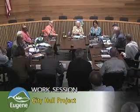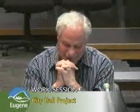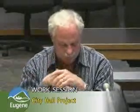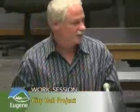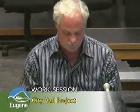Thank you. Councilor Zelenka. And that decision also saved us over $8 million in cost of remodel versus rebuild versus build new. So $1.4 million for 17 to 20 spaces, $75,000 a space, is just too expensive for me. I can see the value of underground parking in the future, and if we had gobs of money, I'd say, yeah, let's do that. But I really don't see us doing phase 2 for the next decade, so we can use that space for parking in the meanwhile and turn the other part into a park for the next decade or so. And I don't see us really needing underground parking for any particular purpose other than efficiency of space, but that has a cost to it. So I'm not in favor of the underground parking at this price tag.